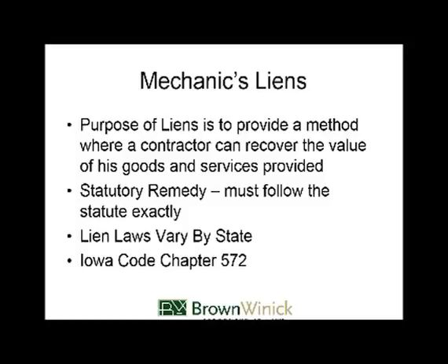Subcontractors at common law who didn't get paid were not going to get paid unless they sued the party who hired them, the general contractor, and could get recovery that way. Many times, as we know, the general contractors, unfortunately, might go out of business or might not have the money to pay. The legislature decided a number of years back that a proper way to handle this is to create these liens. But the downfall is you do have to follow the statutes exactly.